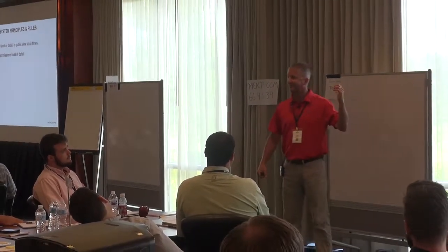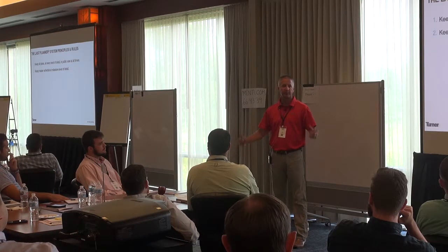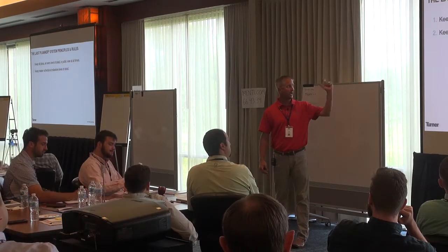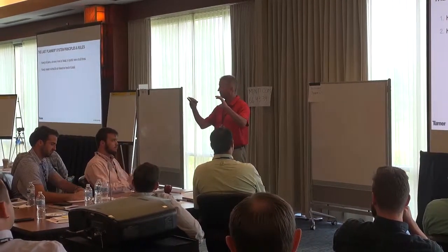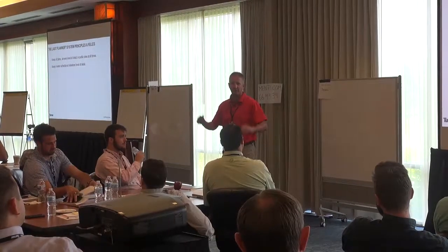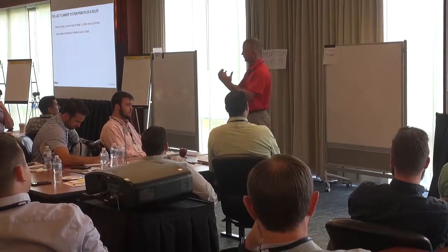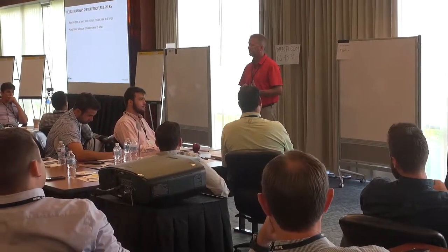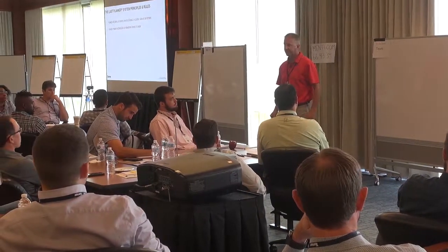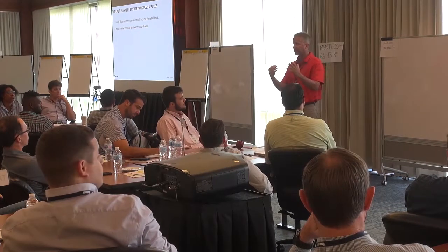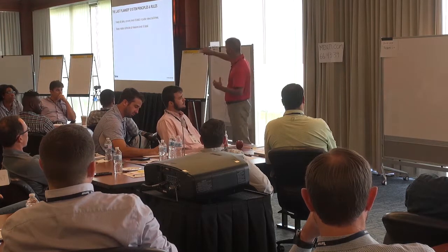William's going to go into a lot of detail with that as we go into much more detail with each one of the components of Last Planner. What I will say is that we're not doing anything different, especially in pre-construction. We're still opening the drawings and taking off the drawings, and we understand the customer's values and what the move-in dates are expected to be. So we're still developing a schedule during pre-construction. It's what we then show to the client and to our trades as we buy out that process, keeping that at a milestone level.